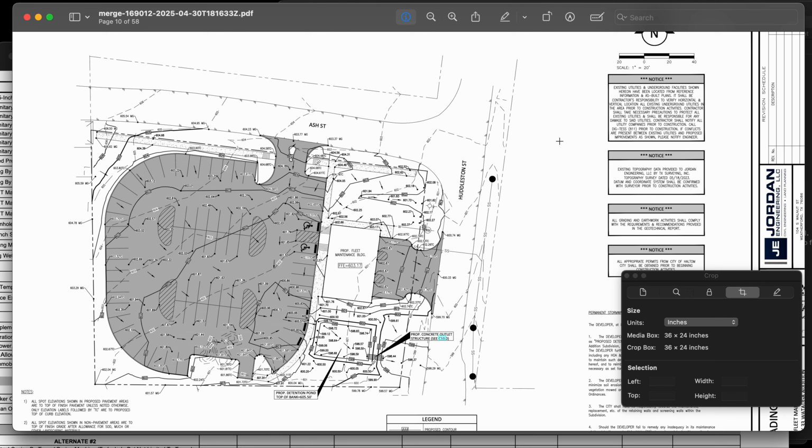When you give the GC a price per load to export the soil, it no longer matters if it's your soil or not. You're being paid to export the soil, and you're being paid a price that you agreed on to export it. So ideally, you want to export that soil, because then you'll be making money on every load that goes down the job site. So that is the ideal goal, right? To make money in each scope line item that you're doing.